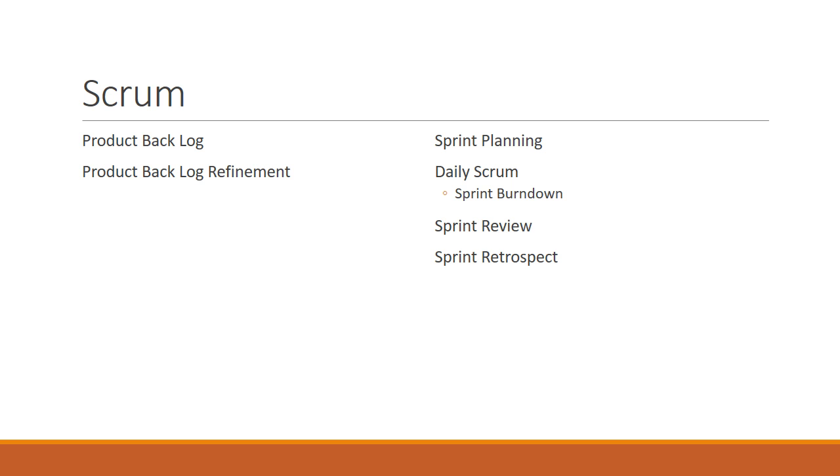Also, as part of moving to the Scrum framework, you'll have a sprint planning meeting, which is when the team negotiates with the product owner what they're going to include in the next sprint. Sprints are on average about two weeks. So every two weeks, some companies using Scrum are actually producing a shippable product. They can go for as long as four weeks.